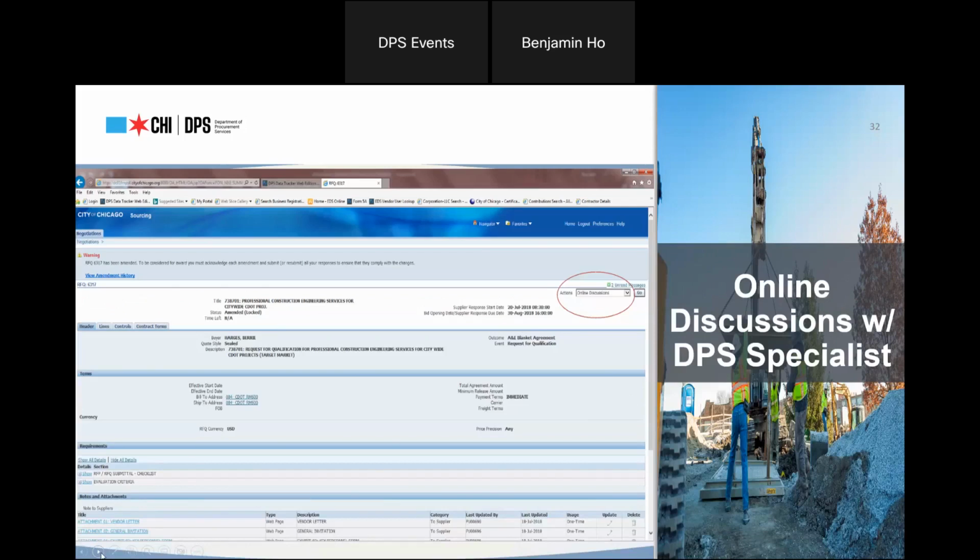Okay, another item is online discussions. Online discussions is like an internal email system for eProcurement. This allows you to ask questions of the DPS procurement specialists. If it's questions related to the scope, you can submit them here. If you just have some process questions, you can ask them here. Scope questions will only be responded to through the formal clarification and addenda process. Other questions about process, they can just respond here.